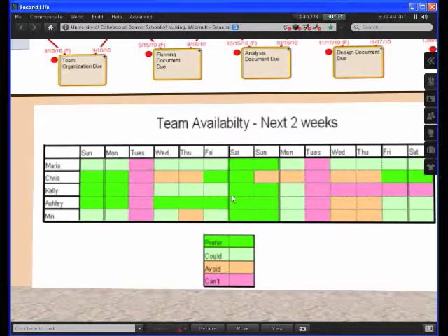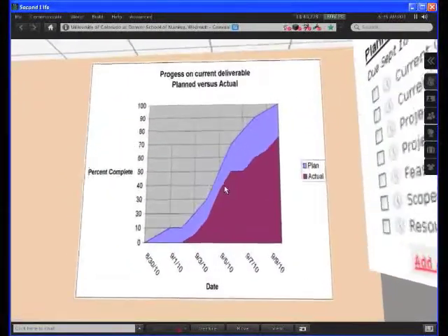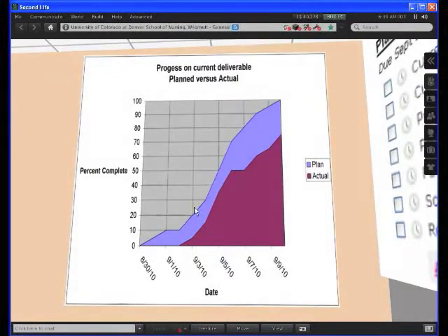And one of the problems in managing a project is keeping track of whether you're on track or not. We can get a higher granularity PERT chart, but one way of doing that is to have just a graph of what % complete we are with the next deadline, or deliverable, versus date. And a 45-degree angle line right up from 0% of the time gone and 0% done to 100% of the time gone and 100% done is what you'd expect. Most actual teams end up being something like the line on the bottom instead of the line on the top, and you can see by the distance between the two how far behind schedule you are.